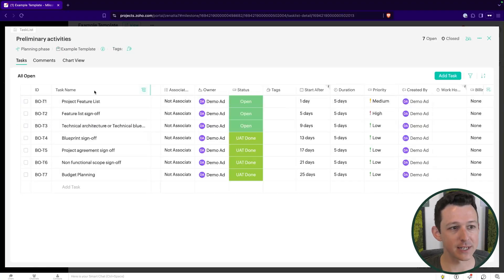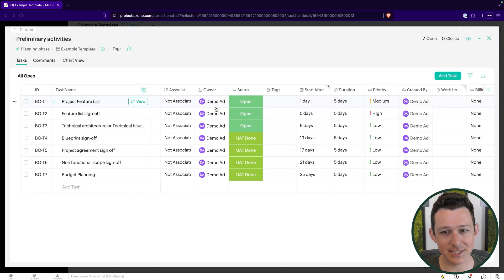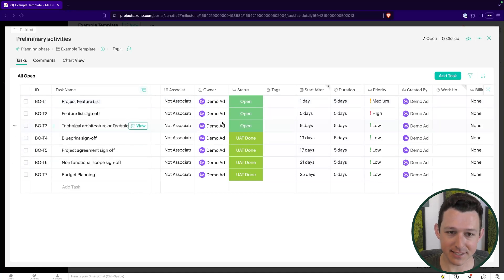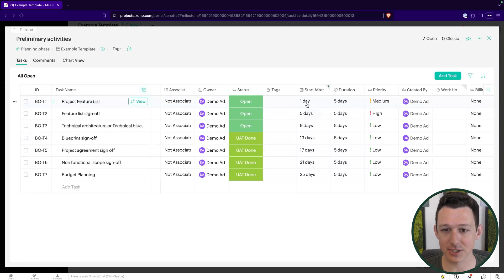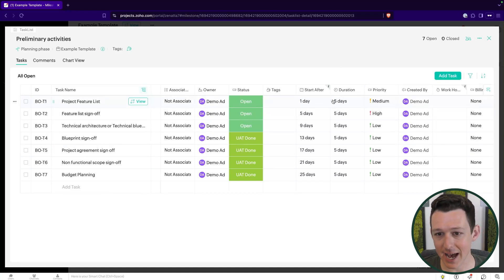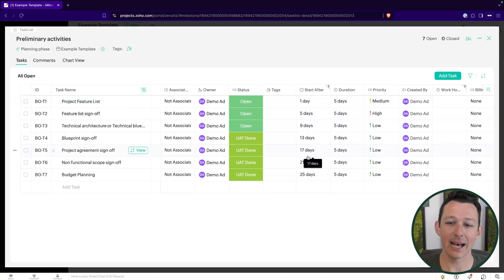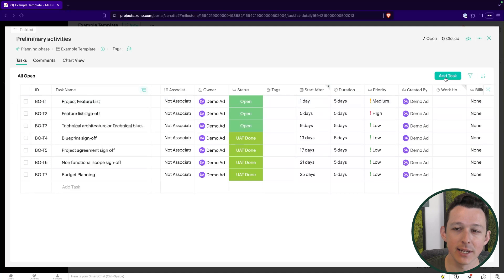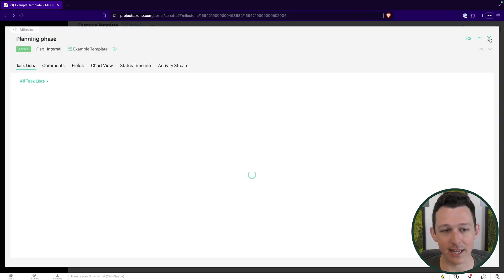Lastly, within a particular task list, we'll have a set of tasks. Similar to milestones, tasks are going to have that start after and that duration. So one day after we launch the project, we're going to start this task, and it should take no longer than five days. You'll see each task is cascading one after another to make sure things get done in a timely fashion. Those are the big three: milestones, task lists, and then tasks underneath those.